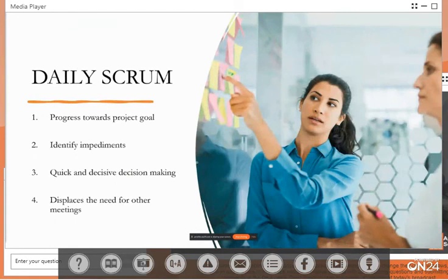Now, an interesting attribute of Agile and of Scrum is having a daily checkpoint meeting. Part of me gets a little bit hesitant to put this one out here. It doesn't always make sense to do, but some version of this I think is really important. And it's this idea that you have a daily check-in. You keep it really short. 15 minutes is typically the standard increment. It's a 15-minute meeting. And what you do is you just really quickly check what progress we've made since yesterday. That's a great way to hold you accountable.